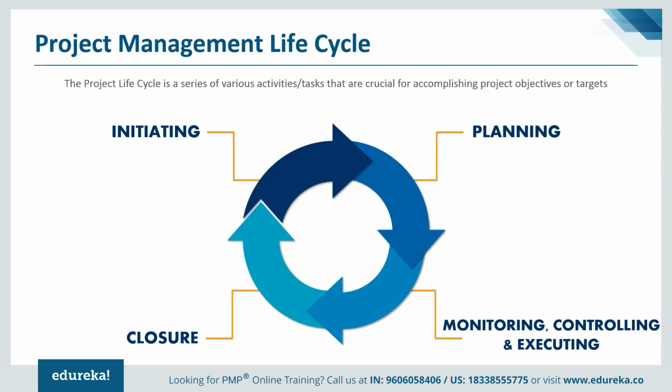Then comes planning. Planning is like preparing a proper plan for each of those items we have to deliver. Planning would also mean preparing the individual knowledge area plans, and also working on the three key things, which are scope, time and cost. So we'll prepare their baselines. The baseline means the approved and signed version of scope, that's the scope baseline. Cost baseline is the approved costing of the project. Similarly, you have a schedule baseline, which is the approved time from the management.